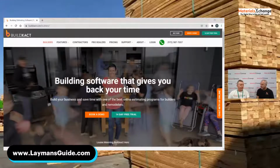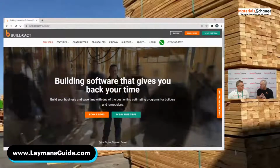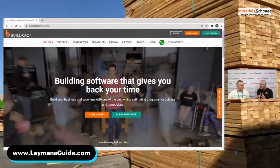It's going to cost me that, this is what it's really going to cost. Yep, and because you've done that work up front, it's easier to manage. That's right, so you get predictability. Every day you open up your Buildxact and see where your actuals are against your estimates on a 4-hour basis. You look at that and say, oh, this is how I'm tracking. And the project will keep you informed. Every decision you make across that project is going to be updated inside of your system.